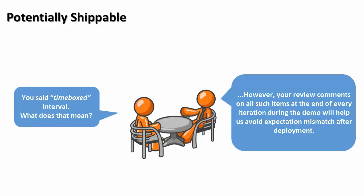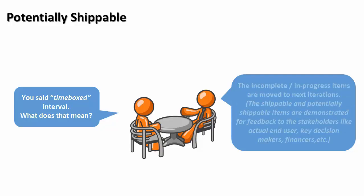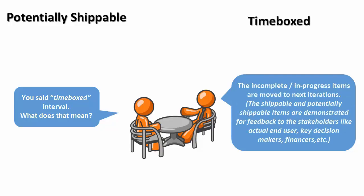You said time-boxed interval — what does that mean? The time box means our iteration or sprint will be over when the iteration cycle time is over. The incomplete or in-progress items are moved to the next iteration.